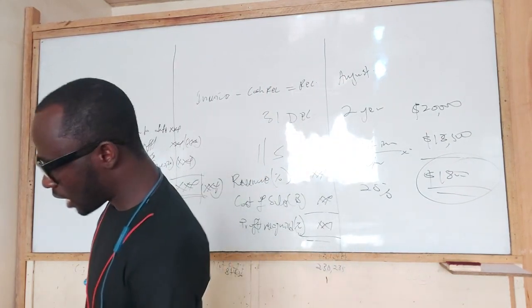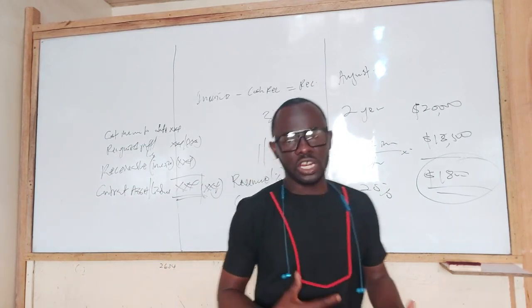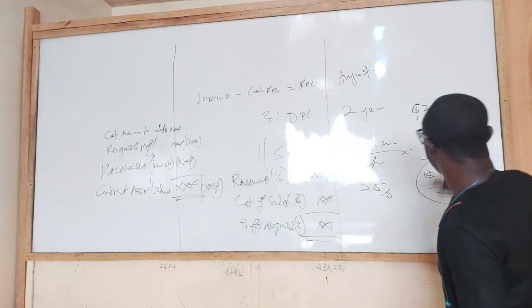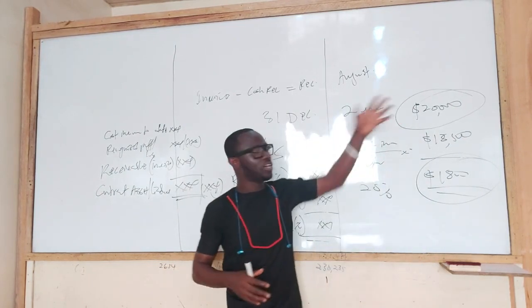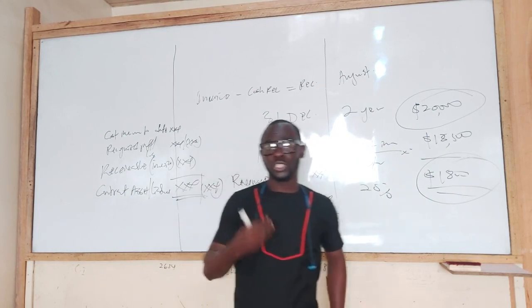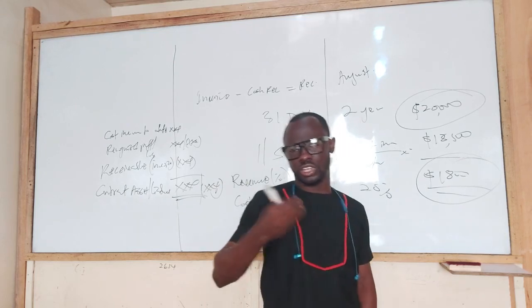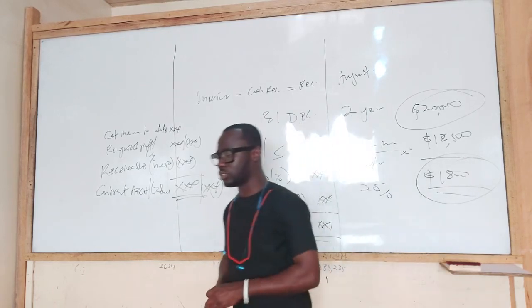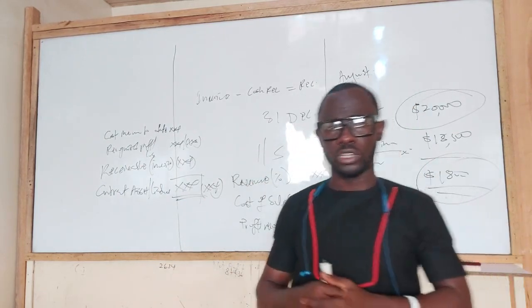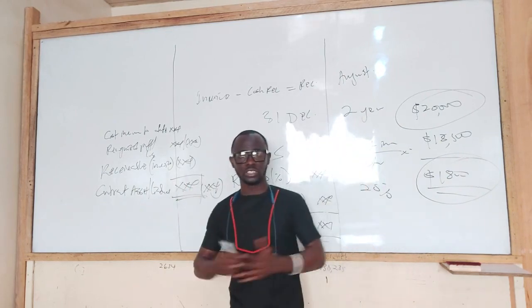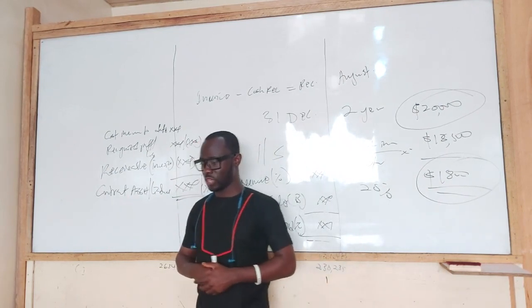Next, cost plus or cost-based contracts. Now, when it comes to negotiating the contract and determining the price of the contract, there are a couple of ways through which the amount to be charged is determined. One of those ways is cost plus. If you did management accounting or costing, you know that cost plus simply means you estimate the total cost you expect to incur on the project, and then you mark it up with your profit markup or profit margin, and then boom, you get what? Your selling price for that product.